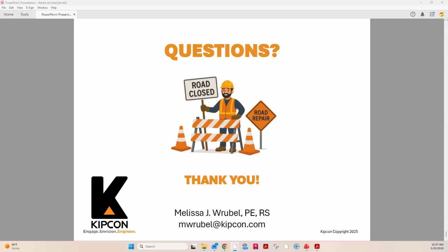Do you do enough vetting for the contractors? What measures or parameters do you consider when selecting the contractors? For Kipcon, as a company, we maintain lists of contractors that we use for various projects. Those contractors are selected on their quality of work, the responsiveness, a number of factors.